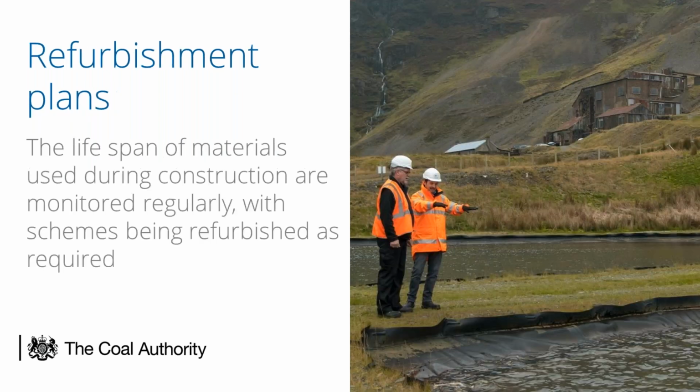Lifespan, we're generally looking at around 25 years plus for the concrete infrastructure, 10 to 15 years for the electrical. An average de-sludge would probably be around 5 to 6 years, and the rebed life we're looking at between 10 and 15 years. If you take the whole capital, refurbishment and operating cost of the scheme, annualised, we're looking at the equivalent of about £200,000 a year investment, and that feeds into our monitoring of the scheme conditions. Performance feeds into our future programme and our future ask for government. I hope that's been interesting and useful for you.